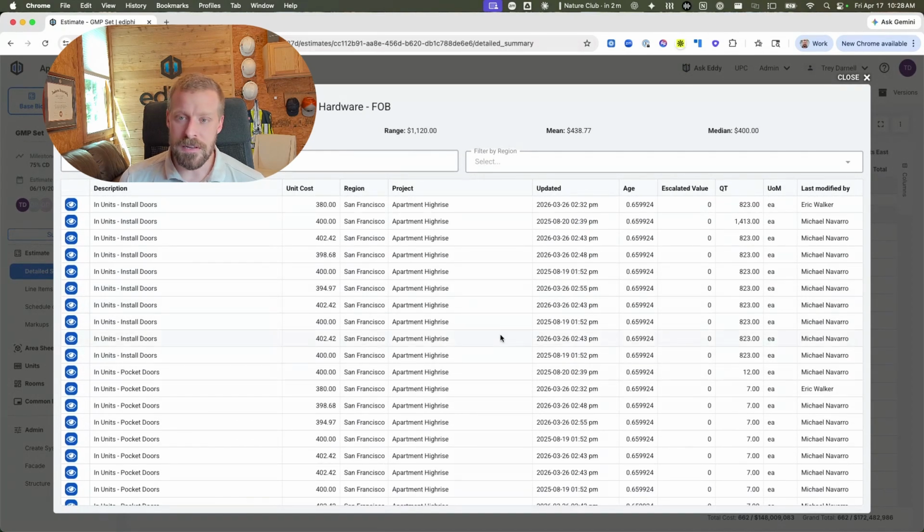So you can see cost history as it relates to that specific line item in that scope without having to run a separate report and try and find the information. So we're surfacing contextual information that helps you learn as you build the estimate. And even if you're more senior, if you're questioning what's my rate on this one, what did I use on the last one, right click on the line and look at your cost rate here. We're going to be doing more with this around analytics and dashboards and things like that. We're going to get into AI.